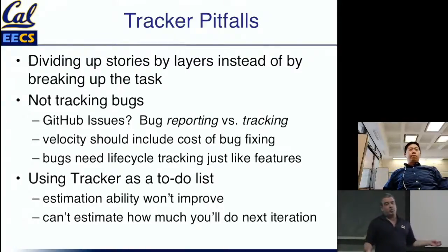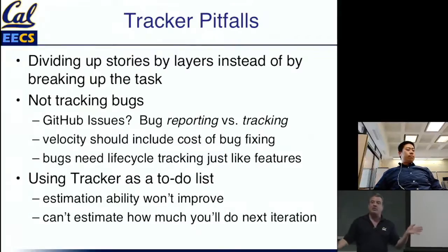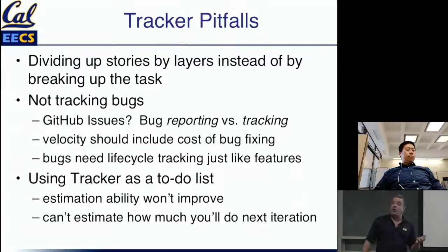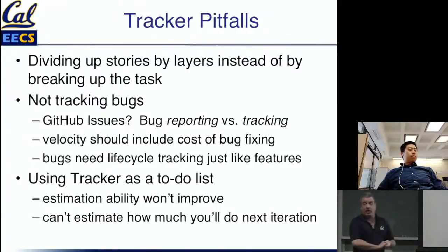And for me, a 2-point story is if I have a whole day uninterrupted, I could knock out a 2-point story in that day. And I'm right, like maybe 2/3 of the time, maybe 3/4 of the time. I'm not right all the time, and I have done this quite a bit. So it is really worth your while to try using the tool the way it was intended to be used, because we think that that will help you get better at doing this more quickly.